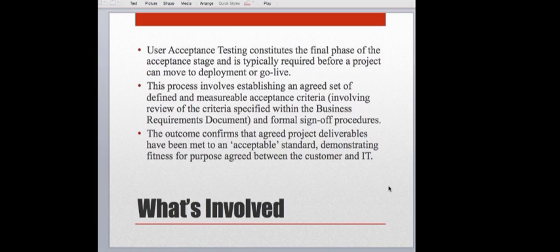That process involves establishing an agreed set of defined and measurable acceptance criteria, involving review of the criteria specified within the business requirements document, and formal sign-off procedures. The outcome is going to confirm that agreed project deliverables have been met to an acceptable standard, demonstrating fitness for purpose agreed between the customer and IT. The customer being the business side, and obviously, IT being the technical side of the team.